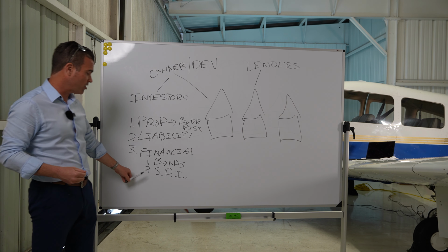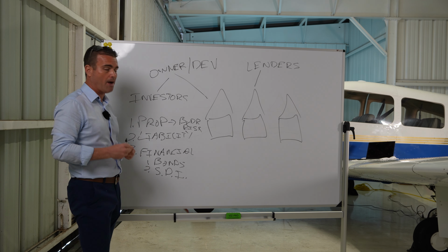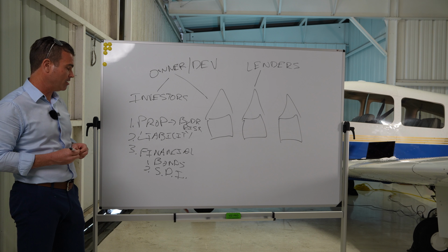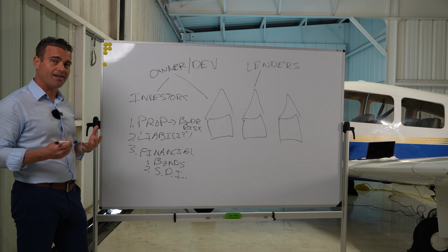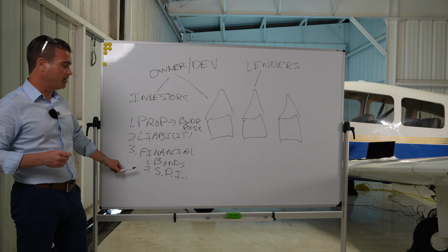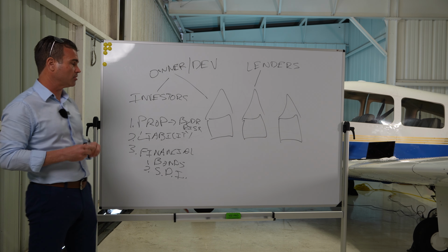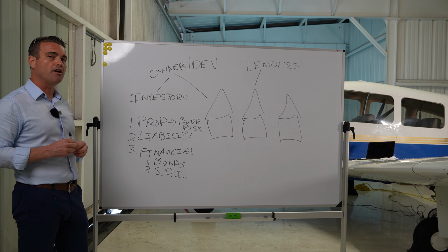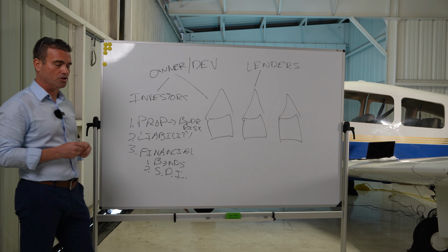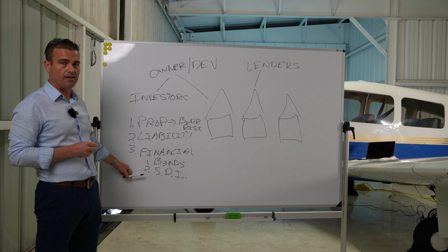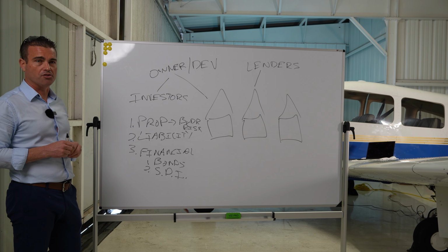So there's another product that's actually gained popularity in recent years. It's called SDI, or subcontractor default insurance. And the beauty in SDI is that we can have a rolling program from the general contractor. It's not bonding, but it's very similar to bonding. It provides an alternative, right? Again, these are financial products. They're not insurance, but it'll provide a recovery mechanism if some of your contractors go insolvent.